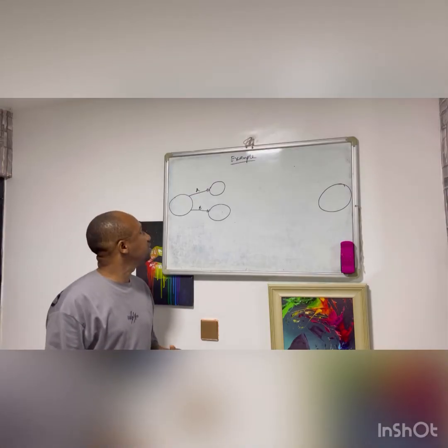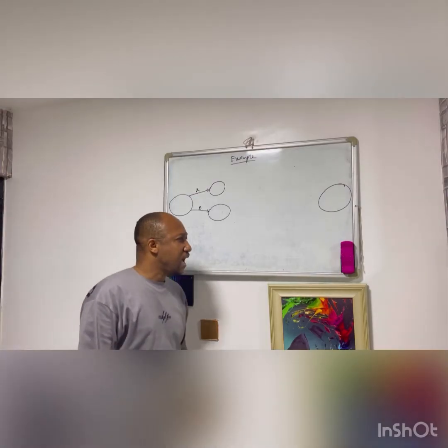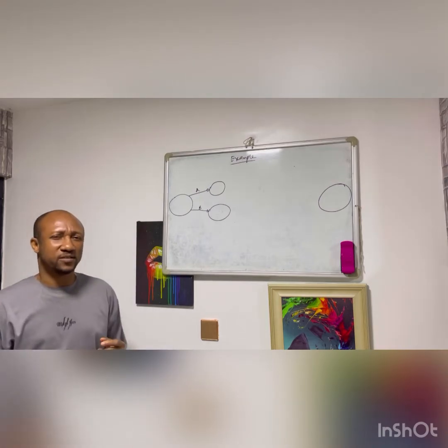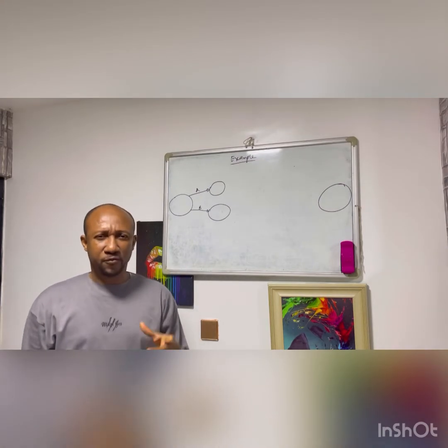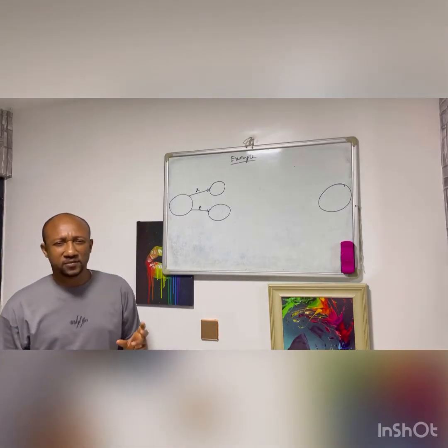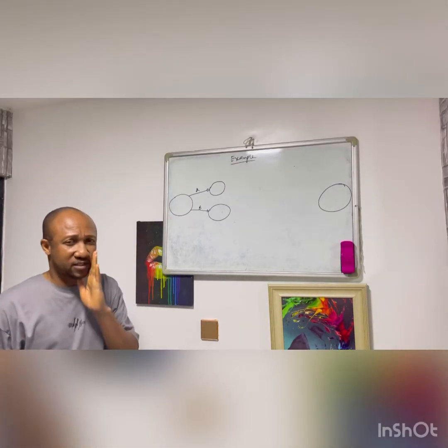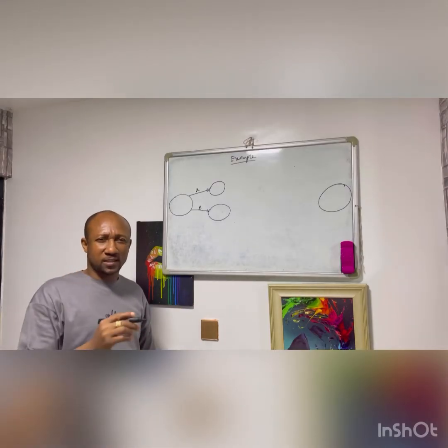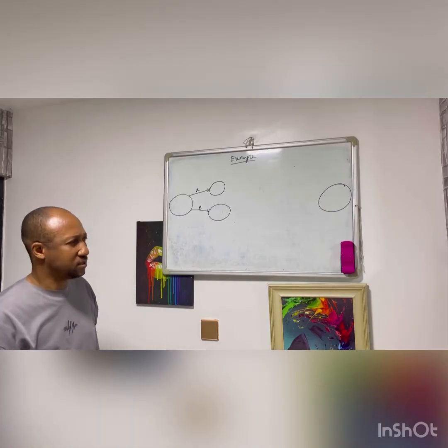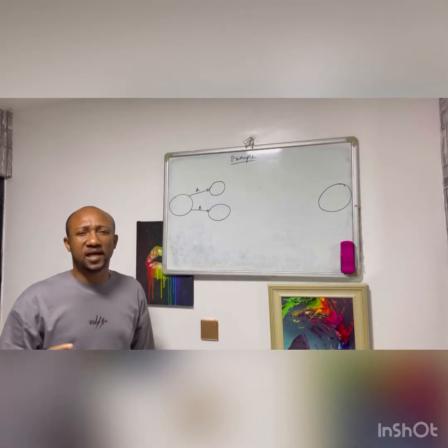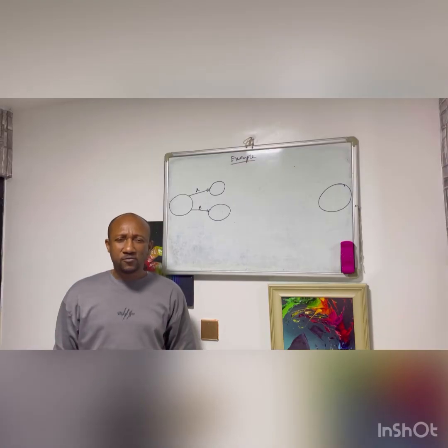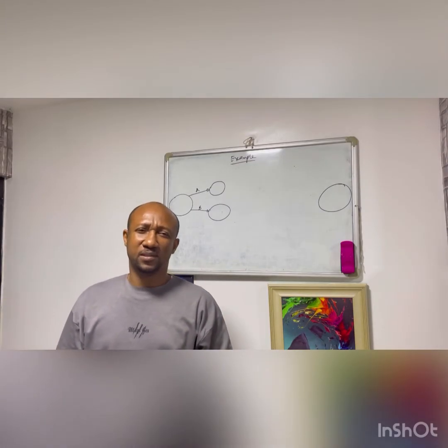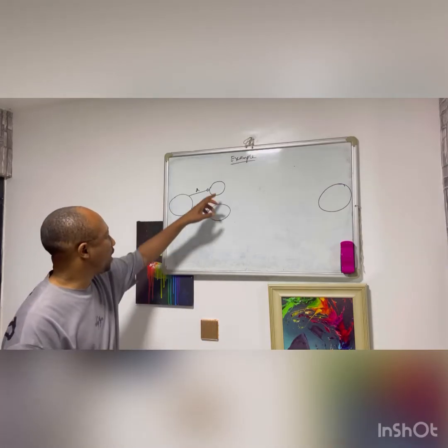Then for activity C, the preceding activity of activity C is activity A. If you look at the example, you will see that activity A is the preceding activity of activity C because activity A is under the preceding activity column, facing activity C. So activity C will start from where A ended.